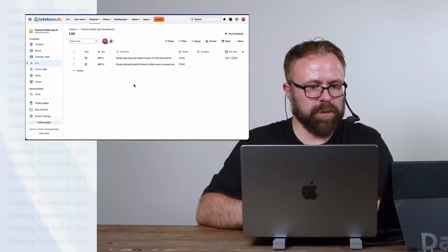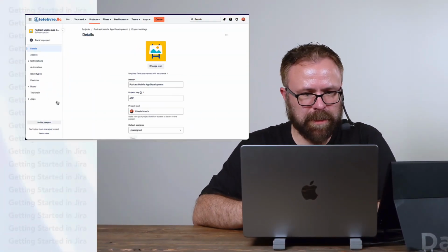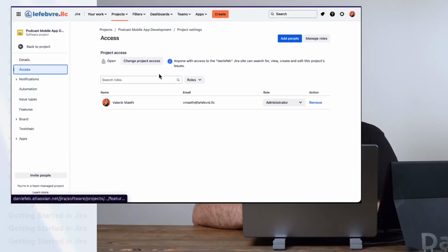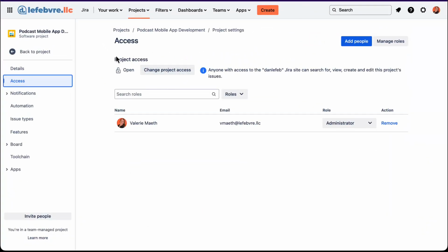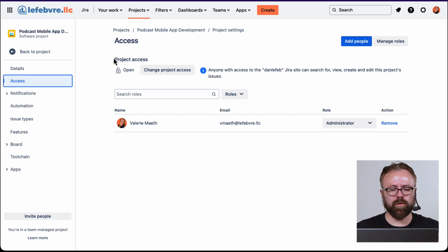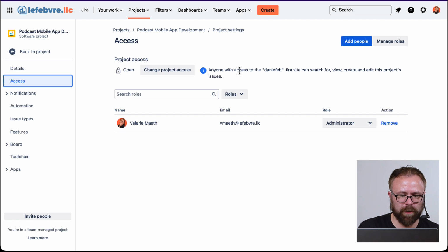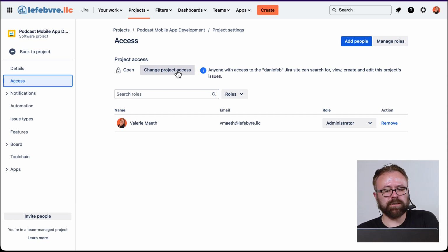In this video, we'll learn how to add our team into the team managed project that we created. All right, so let's hop over to the project settings and into access. Now, the first thing I want to point out is the overall project access that we have here. When we created this project a few videos ago, we allowed everyone with access to our overall Jira instance to be able to see, create, and edit any of the issues inside of the project. As you can see here, it is currently open. Now, we can change that project access here after it's created if you wanted to do that. That's where you can change it.